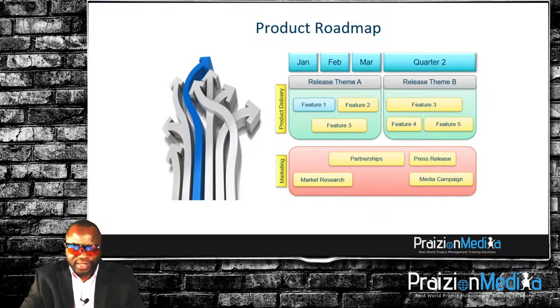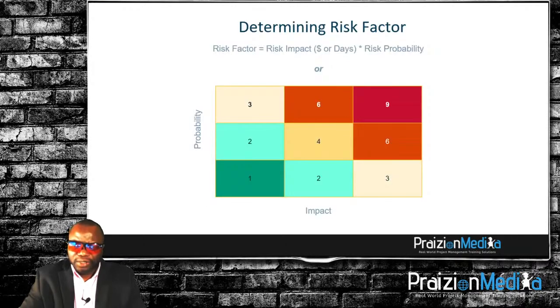So why don't we start off with the reasoning behind a risk-adjusted backlog. The reasoning is as follows. For every one of those backlog items that you have in a product backlog or some other backlog, there's an element of risk on every one of those items. Risk of perhaps not knowing as much as you thought you would and finding yourself in a bottleneck or tailspin. Maybe having to go off and do a spike before you can actually understand what needs to be done, the full picture of it. And for that reason, we want to take a look at all the items.